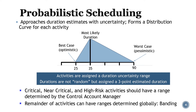The critical, near-critical, and high-risk activities in the schedule are assigned a duration uncertainty range with a three-point estimated duration. In a project using earned value management, this estimating is generally performed by the control account manager, or CAM. The remainder of the activities can be assigned a duration range using a banding approach, meaning a group of activities are given the same probability distribution without individual assessment.